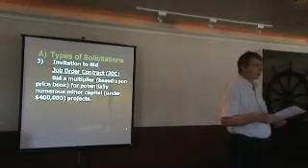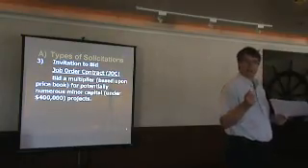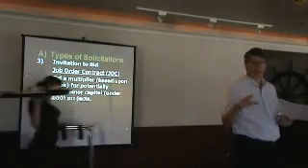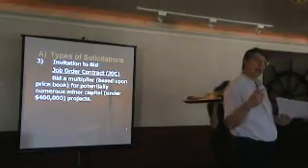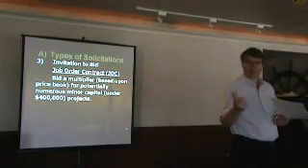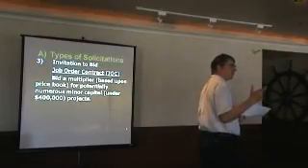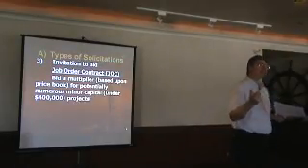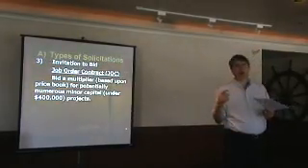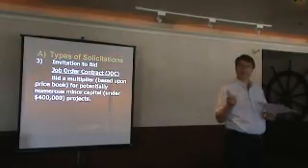JOC contracts are bid as a multiplier. There's a price book, and it's a hefty price book, but it comes out on CD. What you do is you bid a multiplier on that. Before the economic meltdown, we were seeing the multipliers bid out at 1.1 to 1.3 of the price book.